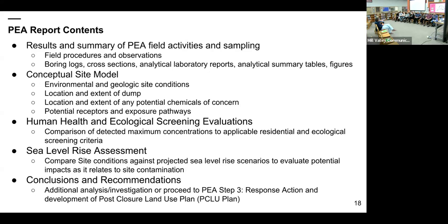I believe it was just around $1 million, but part of that requirement was to sign the land use covenant, which allows you to have a cap and active mitigation measures in place. But the land use covenant also restricts the site to be developed for certain things. And if you don't sign the land use covenant and leave waste or contamination in place, then DTSC requires it all to be removed to not have any waste or potential contaminants there. So as far as this site specifically, we can't make any judgments about what the cost would be to remediate since we don't have any site-specific data.